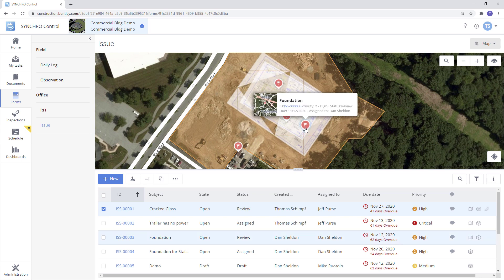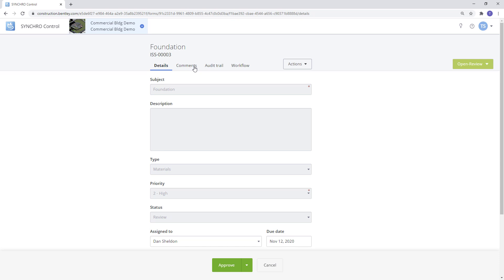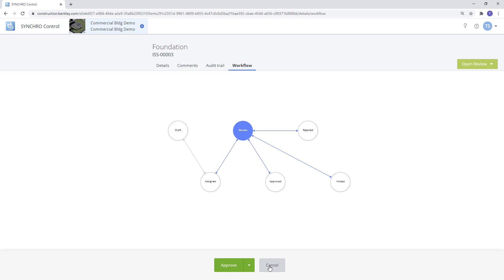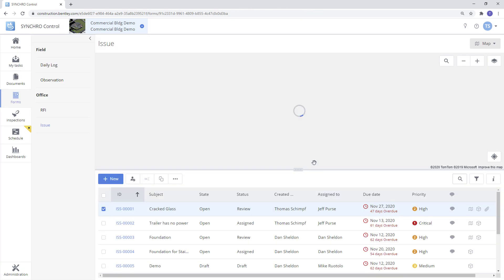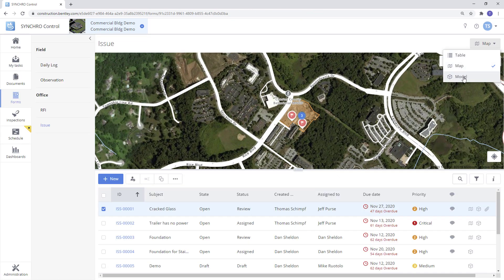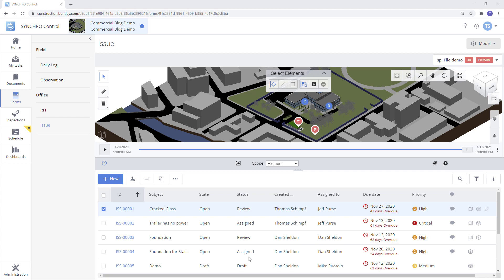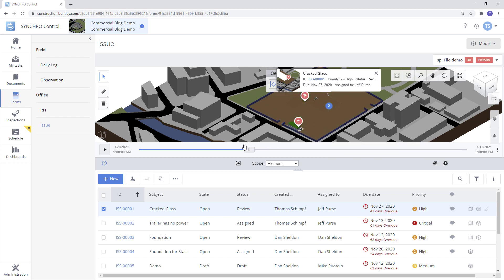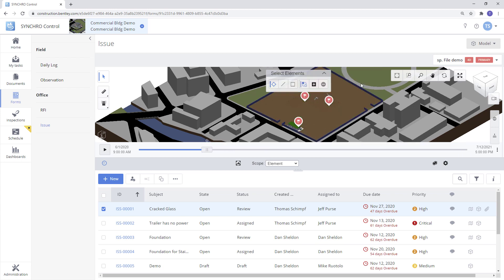You can hover over the icon then click on the form number to see the form information. From here you can see the form details, leave comments and see the audit trail of who did what and when, and reference the workflow if needed. We will also have the model view that identifies any forms that have been tagged to the model. We can scroll through the timeline populated by the construction schedule to see when the issues were created and see them disappear once they have been resolved.